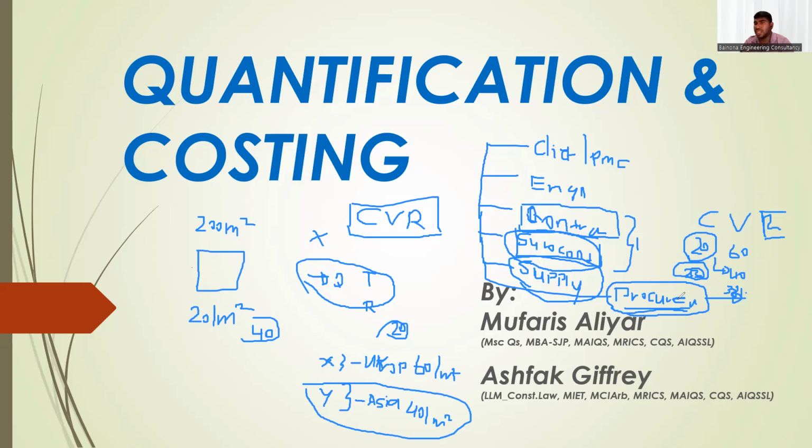Cash flow forecast, they have to submit to the engineer along with the reporting, whatever it is, daily report or monthly report or whatever it is. You need to submit this cash flow to the engineer. The engineer will review it. If he is satisfied, he will send the same to the client.